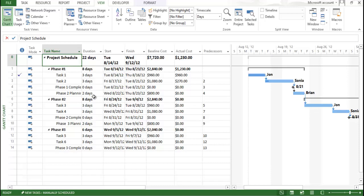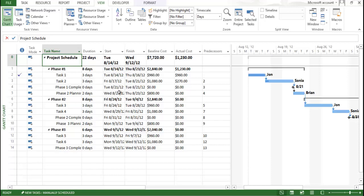For earned value analysis, it is very essential to assign a baseline to the project. I have constructed a normal example schedule because this will help you understand earned value analysis. You need to assign a baseline to the project — there should be at minimum one baseline assigned. Why? Because it is essential to define the budgeted cost. Whatever actual cost you provide is totally based on the site work. For example, if the budgeted cost is 100 rupees but you incurred 110 rupees, then 10 rupees is your extra cost.